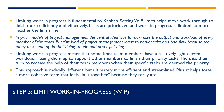The next step is to limit work in progress. Limiting work in progress is fundamental to Kanban. Setting WIP limits helps move work through to finish more efficiently and effectively. Tasks are prioritized and work in progress is limited so more reaches the finish line. In prior models of project management, the central idea was to maximize the output and workload of every member of the team. But this leads to bottlenecks and bad flow, because too many tasks end up in the doing mode and never finishing.